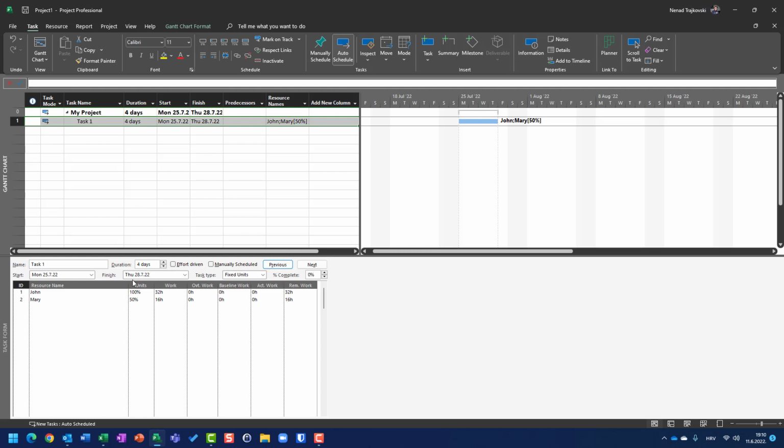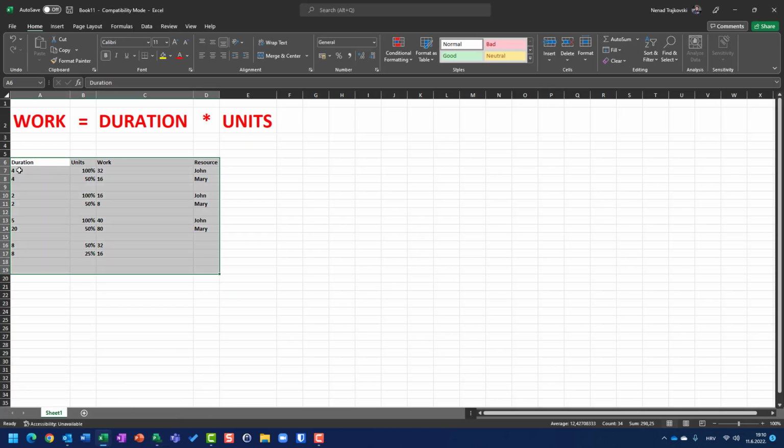For the first example, I created a task and I assigned John with 100%, Mary with 50%. Let's go to Excel and see. The duration is 4 days. 4 days means 32 hours in total.